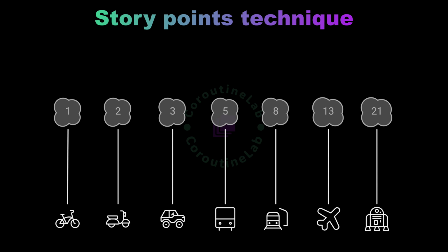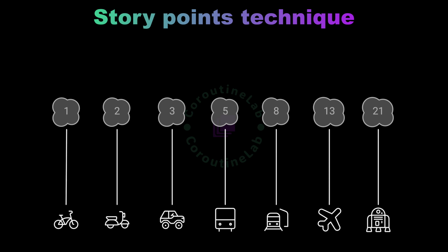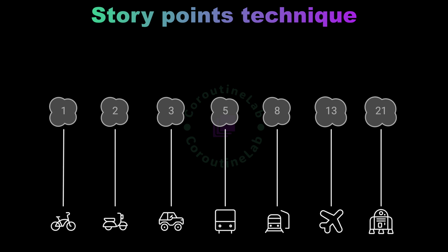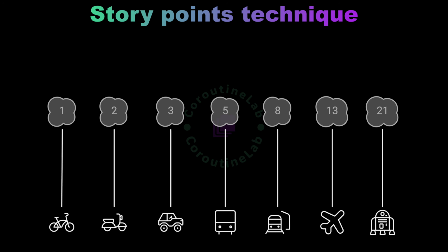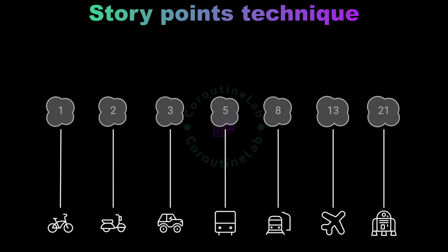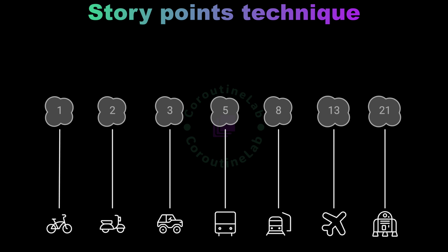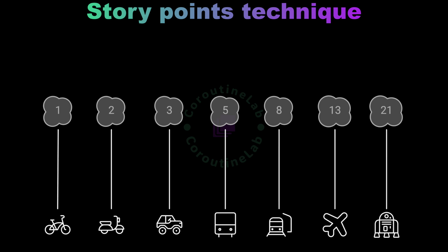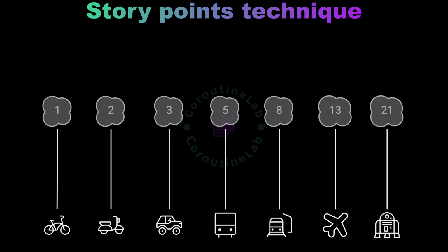It's important to remember that these numbers are not precise measurements, but rather a way to estimate effort in relative terms. Different teams may adapt these values or define their own scale to suit their specific workflow. The goal is to agree on an estimate that reflects the complexity and time required for each story, enabling better planning and prioritization for the sprint.